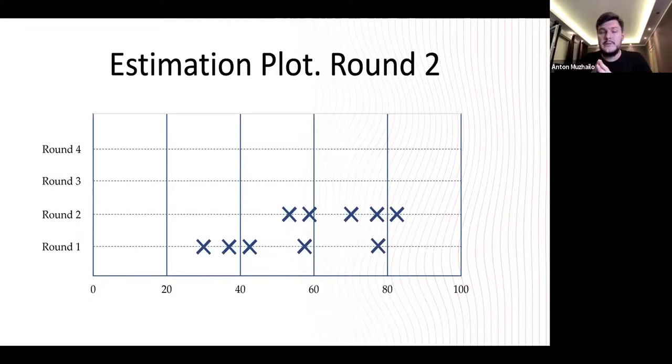What is more important about this is to have the history of the estimation. So if you have it, back it up somewhere. These can be used to learn from your mistakes. For example, after the project is complete, after the release is delivered, you can still have some retrospective and say, hey, we were estimating this and we totally missed the estimation, right? So we just cannot go with it. We need to understand why. So we go back to the archive, we take back those estimations and see our own estimation lists and think, why didn't we talk about that? Why didn't we mention that? Why did we put this number or this number?